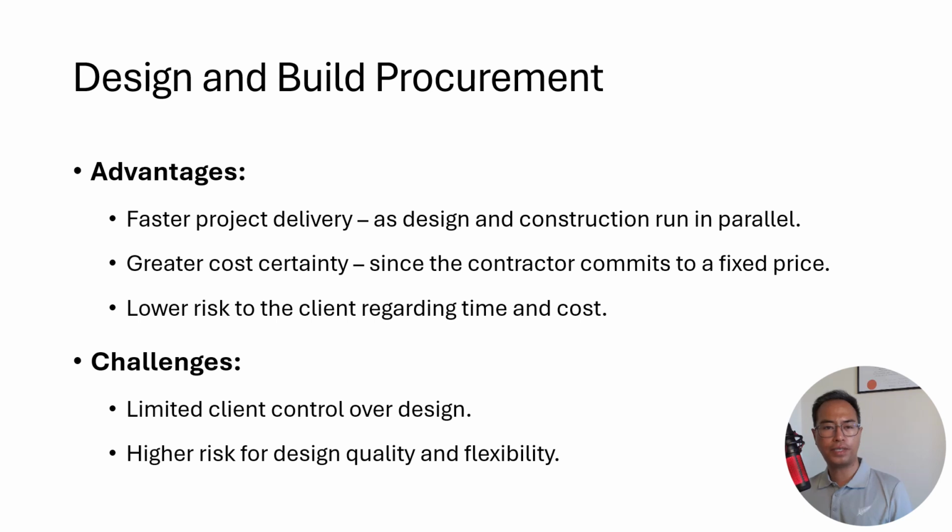The advantages include single point responsibility, some cost certainty, and low risk for time and cost. However, there are challenges such as limited client control over the design and higher risk for design quality and flexibility. This method works well for clients who want a streamlined process and are comfortable with less involvement in the design phase.